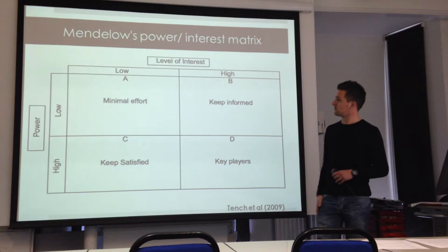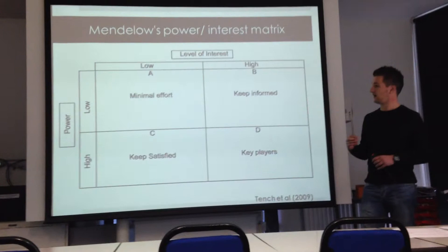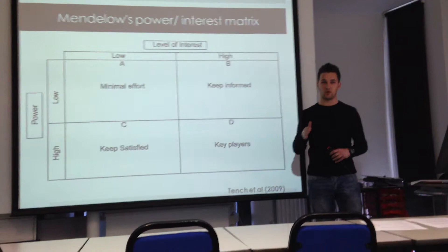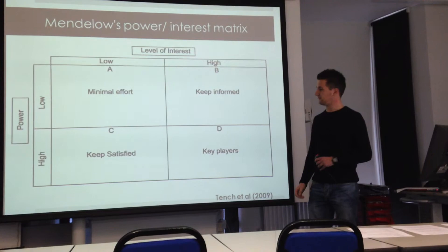For high interest and low power stakeholders, you keep them informed. They have the interest to do something about it — if they are upset and not kept informed, they will go to someone and put in the hours, because they're interested enough to get something done about it.